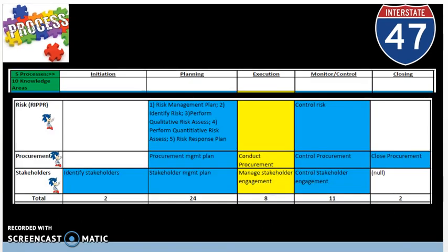Similar to the other knowledge areas, we need to plan for how to deal with external vendors and suppliers, as not all services and resources are going to be available in-house. An example of procurement is to use a third-party licensed software such as Amazon Web Services in the cloud for server or network hosting, or Tableau software for reporting purposes. In a nutshell, we need to plan how you're going to procure services or software or other tangible or intangible pieces to carry out the project.